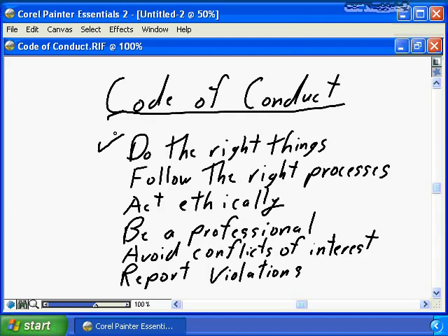Or should I be taking the right action for my organization, realizing that it may cause some subtle issues for your project? As defined by the PMI Code of Conduct, when there is a potential for conflict between the project and the organization, you need to review that issue with your advisor, your acceptor, your management, to ensure that you aren't putting your project ahead of the organization or the organization ahead of the project. So again, doing the right things means taking things up the organizational chain, the responsibility chain, to ensure that you are in fact doing the right things.